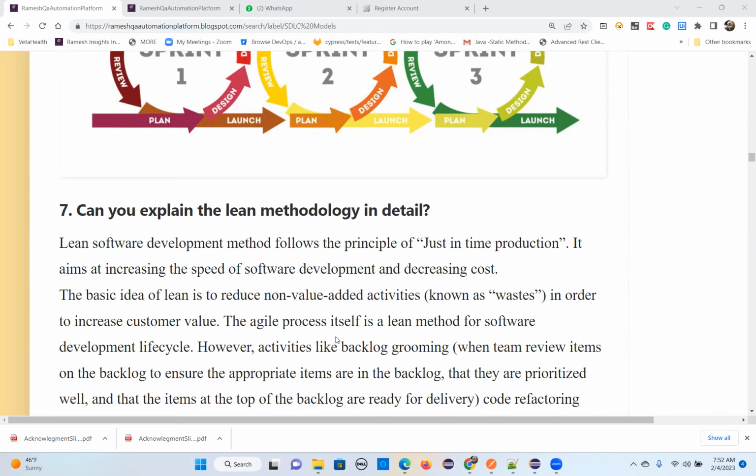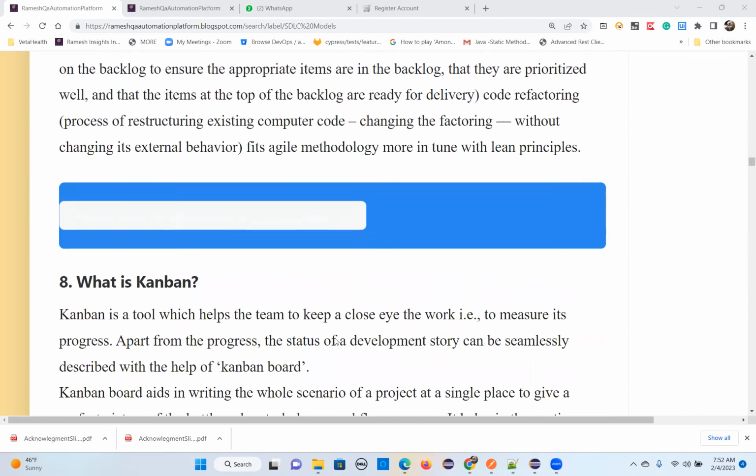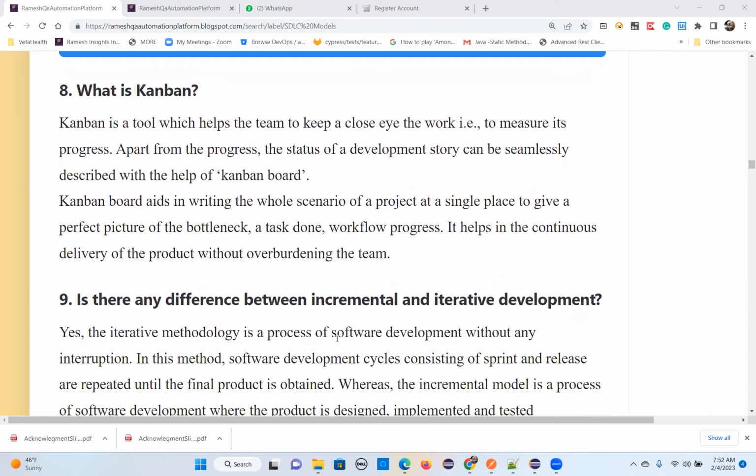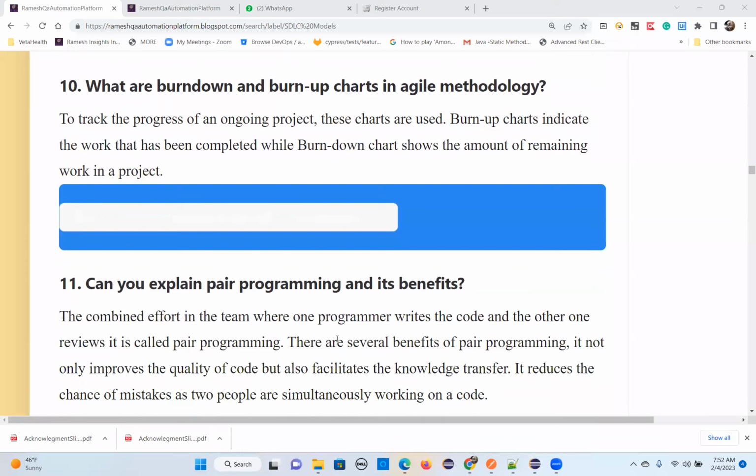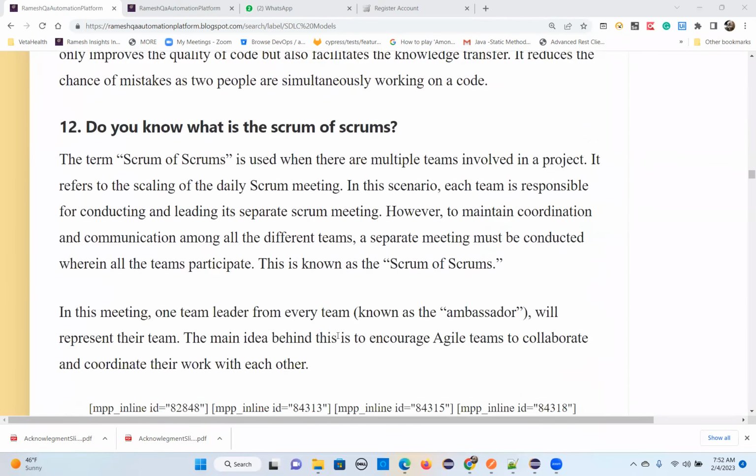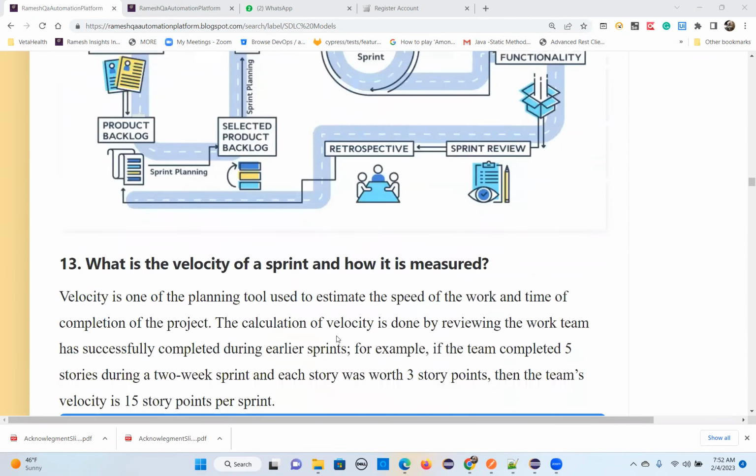Anything missing in the user story is added, or the story is redefined if the requirements are not clear, and story points need to be refined. All these points are discussed, and you modify the user story. That's what backlog grooming or backlog refinement means.